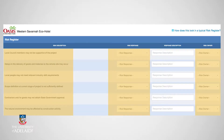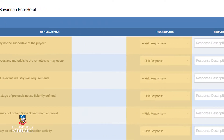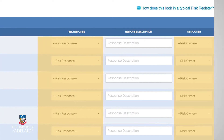We will be exploring what a risk register contains and the type of information that you would need to include. The risk register, also known as the risk log, is a formal master document that records all your risk management work, such as identified risks, their likely consequence or impact, and any steps that need to be taken to respond to the risks. The most effective way to record and present risk register information is as a table, spreadsheet, or database.